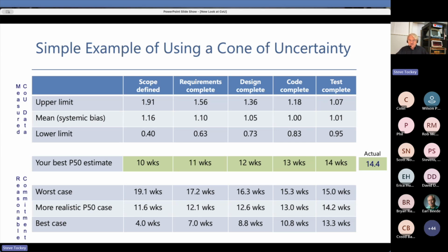So we're using a cone of uncertainty as calculated from previous data, but as we're using it, we're actually picking up more data to use next time we derive a new cone of uncertainty. So we may run some number of projects over a calendar quarter, take the data, update the cone, run another calendar quarter, take the projects, update the cone, publish it, et cetera, et cetera.